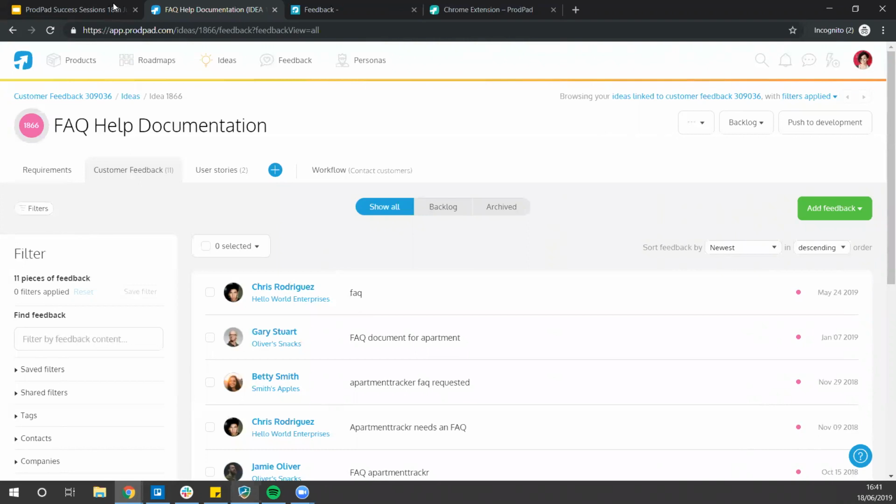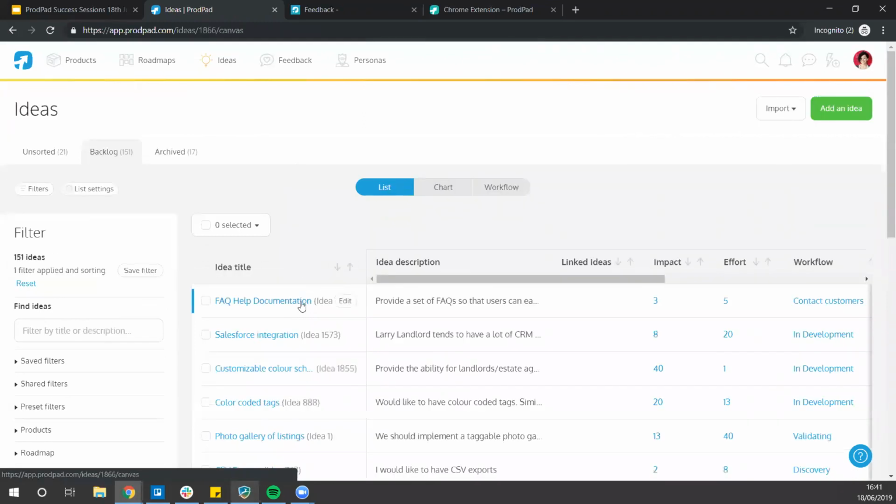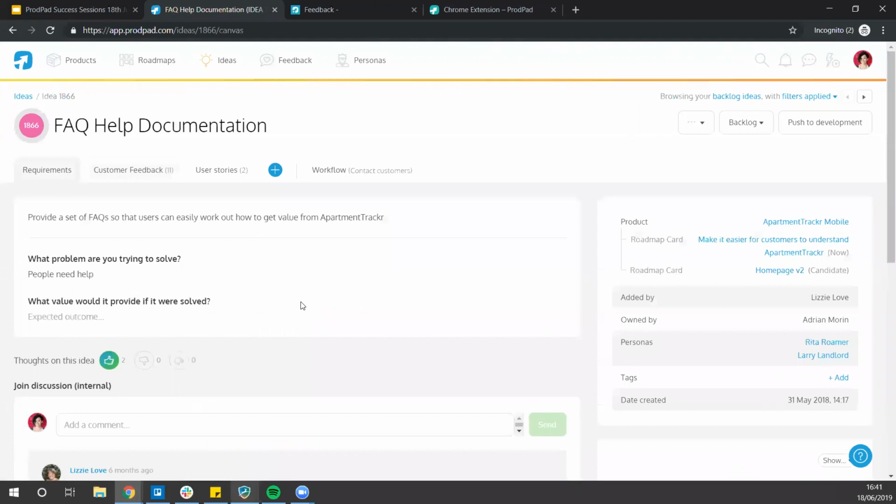Yeah, and just to add to that, on how that fits into ideas and feedback, it's going to be very difficult for you to get feedback from a customer in that format. So you may just need to gather the information that you do have, whether it's you speaking to the customer, or colleagues, or if they've just sent it in, and try to dig in a little bit more. If you can't get down to the problem they're looking to solve, if it just sounds like a request, try and dig a little bit deeper, do the whole 5 whys, and document that in your feedback. And then the ideas will be about potential solutions that could solve that problem.